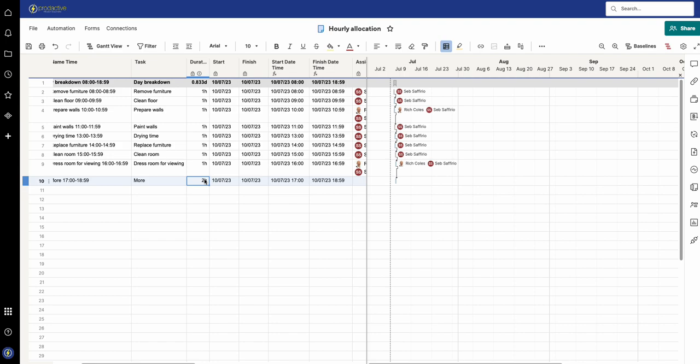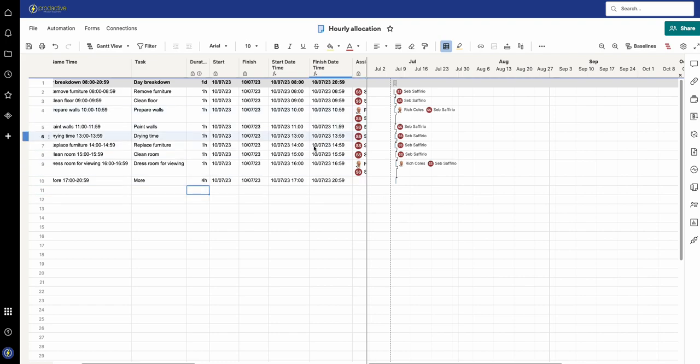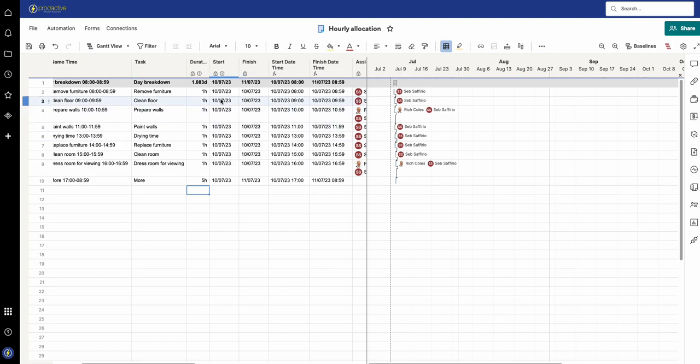If I'm going to make this now three hours, you can see that still works. Four hours, and that still works again. So that takes you to a 12 hour day. If I make this five hours, it's going to spin over to the next day, starting at 8 AM.